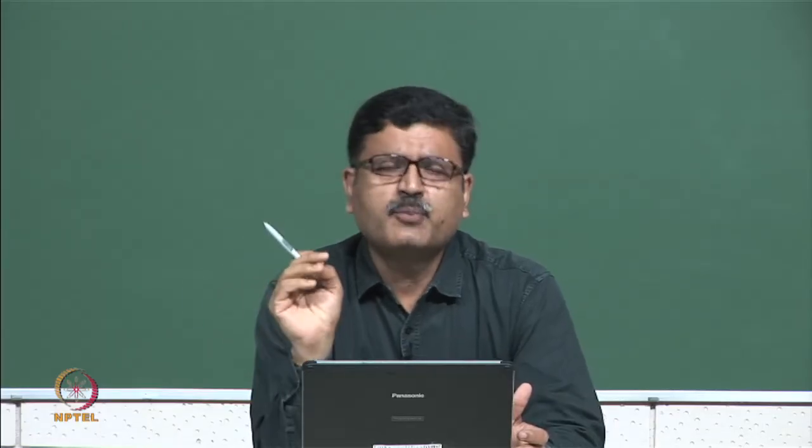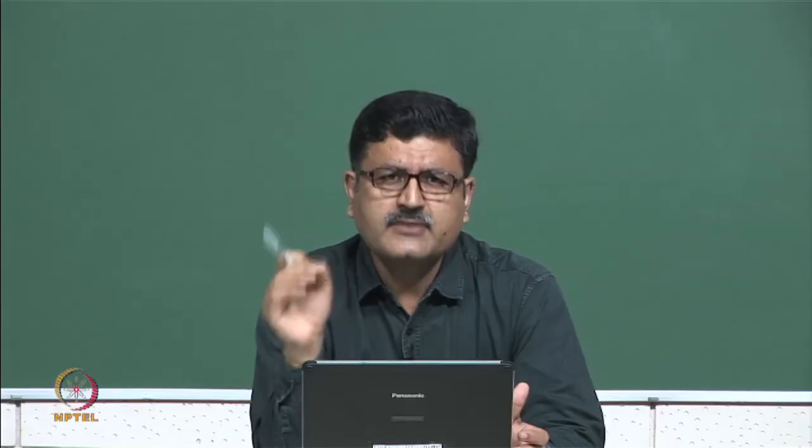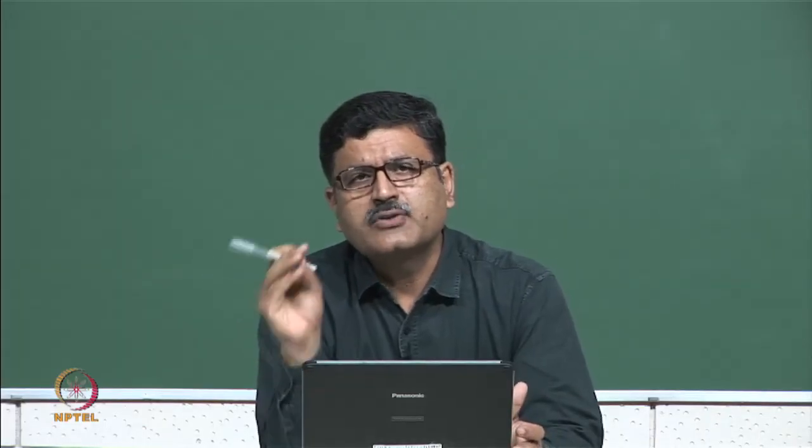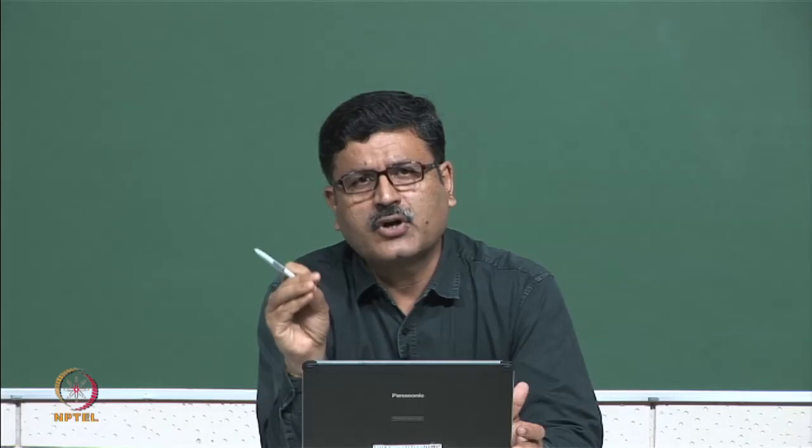So, this 18.9 lakh, whatever is blocked, I must get a return out of it. So, whatever is the interest I am losing, at least that I will put in the indirect cost, and that is what we will be doing. Now, there are a few more items which come under the working capital. So, basically we are trying to find the total working capital that I need to employ at my project site. One of the components of working capital is stock, and that is why I told you this calculation process. Then the next step is for what value we are keeping the fixed assets at our project site.